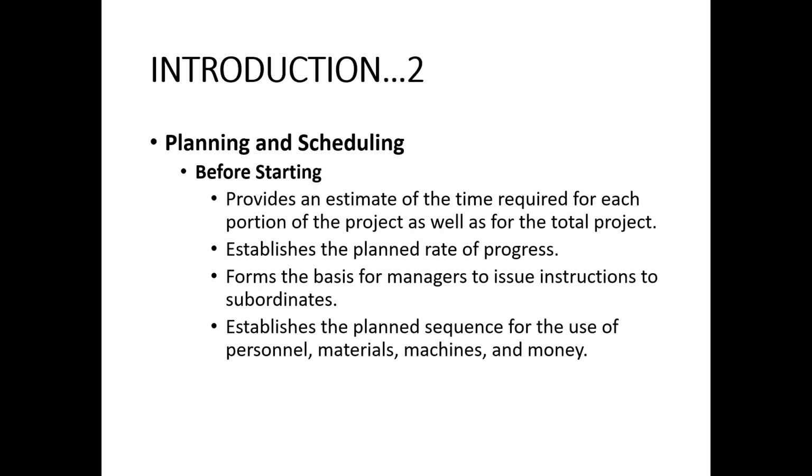So then, the planning and scheduling will also establish whether the rate of work performed is linear, or whether it will follow some other pattern as well. Normally, we assume a linear progress of the work for simplicity. For longer activities and for smaller activities, there are some other distributions as well. So anyway, if we go deep into the planning and scheduling, we can also have some idea about the planned rate of the progress of the work.